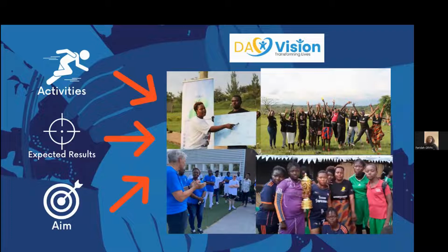A person on the team will identify the participants, for example a group of 20 child mothers, and then plan what chemicals we need for 20 people to make soap. And we make a project schedule, who will do what and when. The expected result is for them to learn to make soap, to sell, but also to keep themselves, their children and their houses clean. This makes them feel good about themselves.